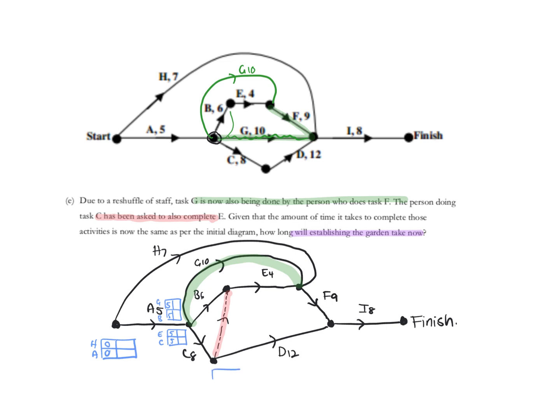So off we go, and I might just go down along the bottom. If I go along C, then D has to wait for C, so that will be 13, 5 plus 8. And then we'll get up to here, and this will be our I. So let's just put our options: 13 plus 12. I'm just going to put them there because there's a few ways now. Now E's got a few things happening.